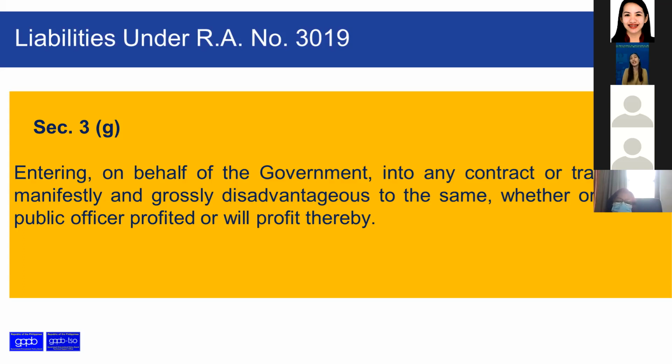Tapos yun pala, nag-rely kayo sa kabilang municipality, nagkopyahan. Maraming kopyahan ng mga ganyan eh. Kasi magkakaibigan naman kayo, same position, di ba? Nagkikita-kita kayo sa mga training, lagi lang sa DILG. So, nagkopyahan. Di mo alam, hindi na pala sila nag-market analysis, o nag-market analysis sila. Sabi nila, mag-procure tayo ng ganitong heavy equipment. Sige, punta ka doon sa tindahan na yun, tingnan mo magkano price niyan. Isang tindahan ang pinuntahan: ganito yung presyo namin. Talaga? Sige, lagyan na natin ng ABC. 960,000 yan sa amin. Sige, i-flat na natin 1 million para pasok pati yung ibang bidder.